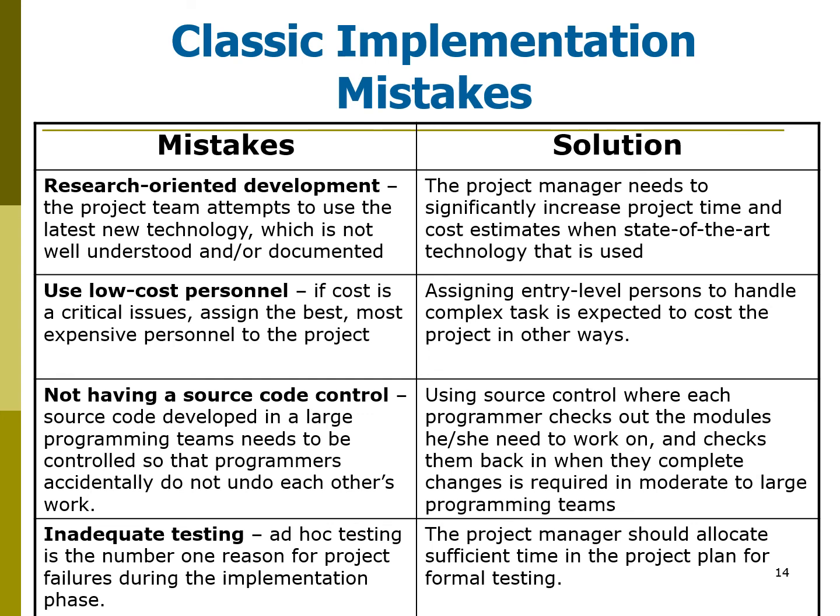So if the project is research-oriented development, a way to avoid errors is to allow more time, so that the team has more time to learn about the technology. All right. The second common mistake during implementation is the use of low-cost personnel, meaning that you hire a slightly cheaper programmer, less qualified, and the experience might not be very long.